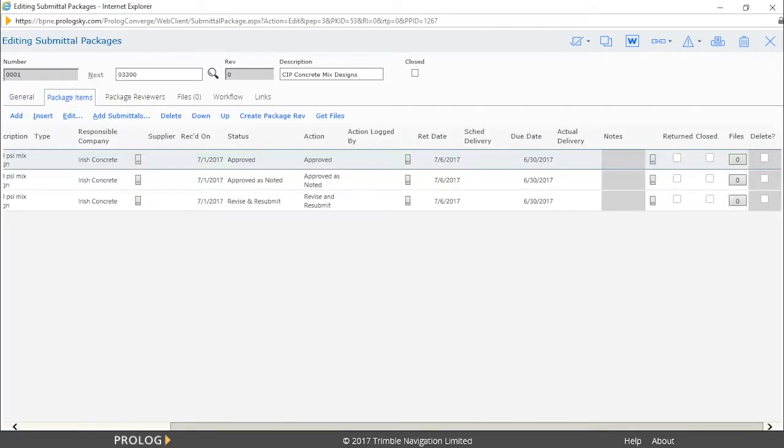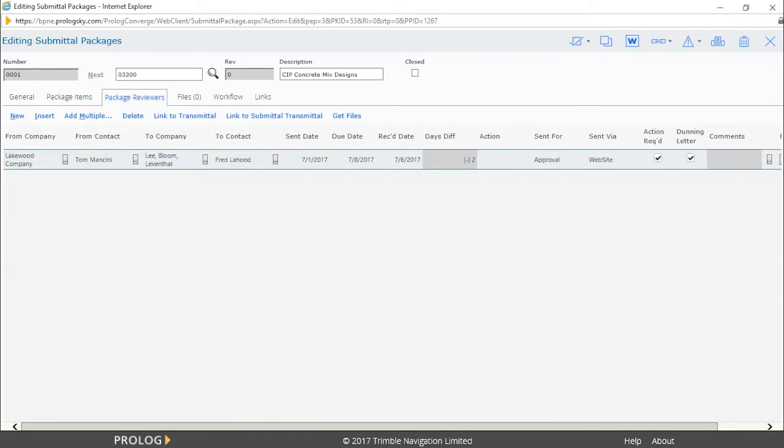Lakewood Company received a notification that a new package was created and verified the submittal items. The package was then sent to the reviewer, Fred LaHood.